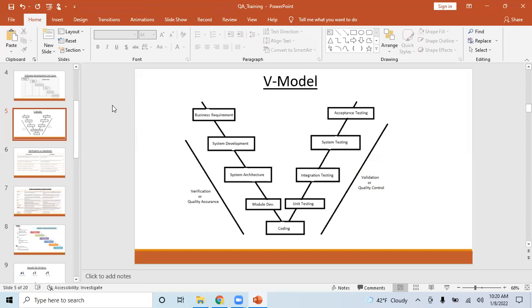Right? So acceptance criteria plays a very important role. Also, we have to validate these acceptance criteria with the end customer, so that they will accept the product. Tomorrow if the end customer says, hey, why have you not implemented this, we can say, we validated this acceptance criteria with you, and that time you said only these 4, right?